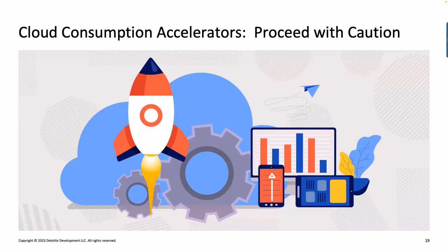And sometimes there are penalties. So what does that become? Becomes a pressure on your neck to go and say, consume, consume, consume, right? Be aware of these things, because reality comes and says, this is reasonable. This is not reasonable. Look at the platform, how long it takes to do the platform. Are you highly regulated type of industry? And if there are any assumptions about your platform, especially if you're starting from scratch, that says 3, 4, 5 months, red flag comes up, right?